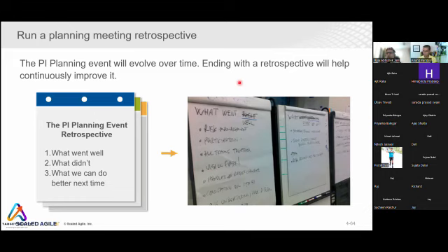Then your RTE, then product management, and all will support you to increase your confidence level, and how they can help you: owning the risk or reducing the scope, clarifying the scope, adjusting the business priorities, adding more resources, giving help by the other teams. So there are many things which can be done. Then you will say, no, my confidence level is 4 now. So all those discussions should happen during the confidence vote. If more planning is required, then do the extra planning.